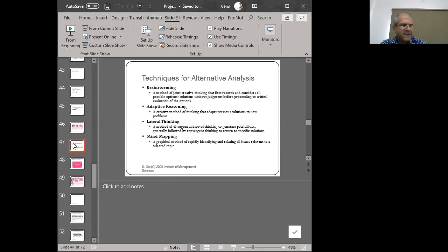And there are different techniques that are useful in determining alternatives, right? So one way is to do brainstorming. Now, what is brainstorming and why is it written at the very top? Well, brainstorming is where people throw out their thoughts. You note them down. You don't pass any value judgments. Once the group has exhausted all their ideas, then you evaluate and then you choose.